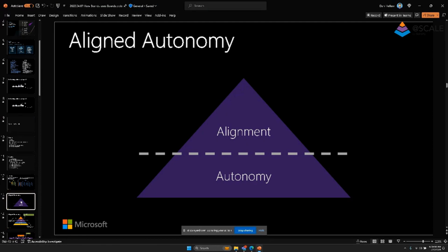But there's a reality here that, if every team had the autonomy to go do whatever they wanted, it'd be a mess, right? You can imagine that if our boards team were doing things one way, and let's say for sprints, for iterations, the boards team had sprints of 2 weeks, and the repos team had sprints of 1 week, and another team had sprints of 3 weeks, it'd be very hard to understand what is getting done in what sprint and how to deploy that stuff out.